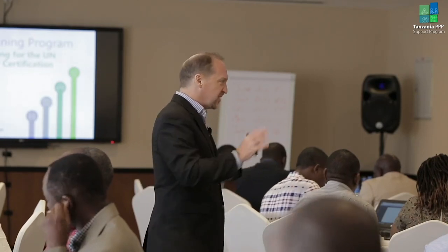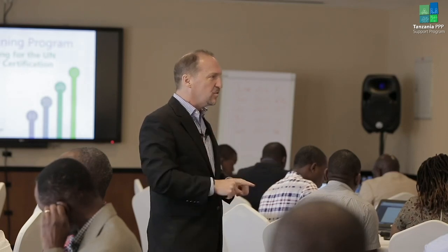And sometimes if you were to link it to other things and say, well, you're generating electricity, but there's also another deal where you're extracting natural resources or you're involved in other lines of business, that's very difficult. And oftentimes you'd find investors or lenders saying, no, we're going to ring fence this, if you will, so that all the contracts, all the investment are for one project purpose.